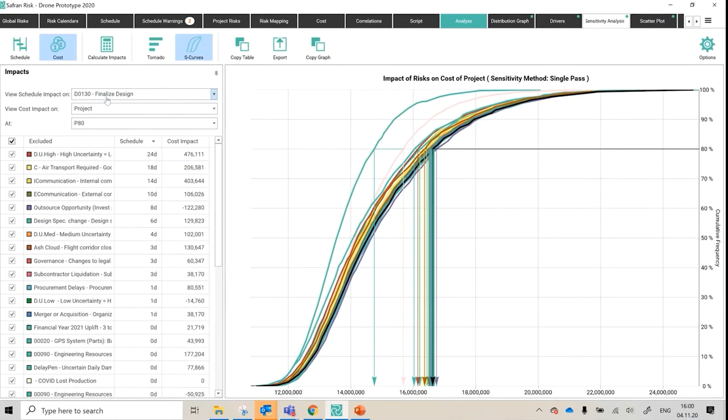It wasn't until I went back to the developers and investigated with them that they pointed out what I had done. Because I was using the alternate position based on action toggle, blending my pre and post mitigation together, the post mitigated costs of mitigating the air transport risk, which meant upfront cost or investment to mitigate against it, to guarantee a booking of some extra trucks on the road or wherever it might have been, was actually coming through and affecting the design phase.